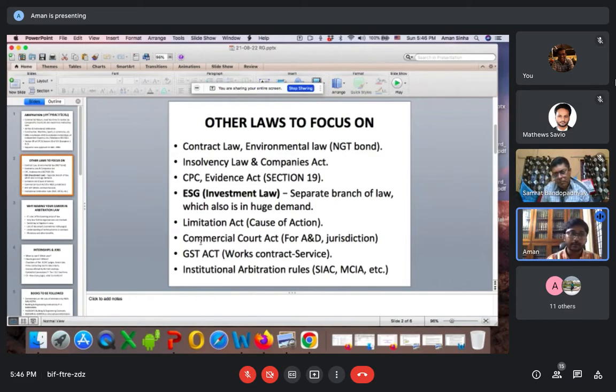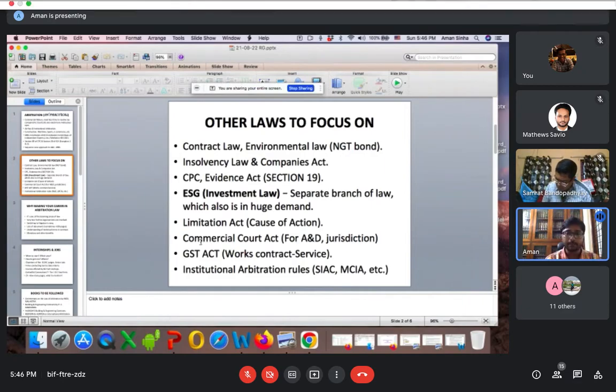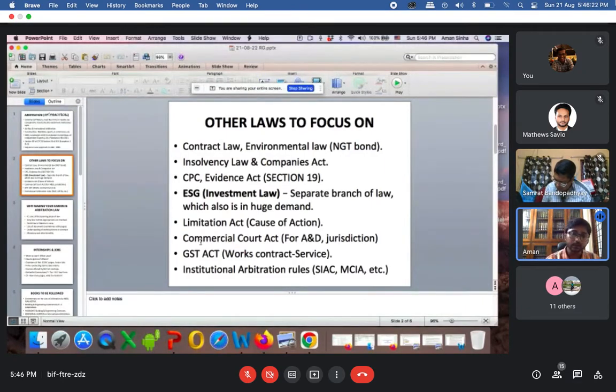When I am giving any SOC or SOD, it will contain exhibits or annexures. Whether those exhibits or annexures are admissible, or whether the party is denying them, is handled by another step after the submission of SOC and SOD, which is the statement of admission and denial. In the preliminary meeting of the arbitral tribunal, they decide whether the admission and denial format will be as per the Commercial Court Act or not.